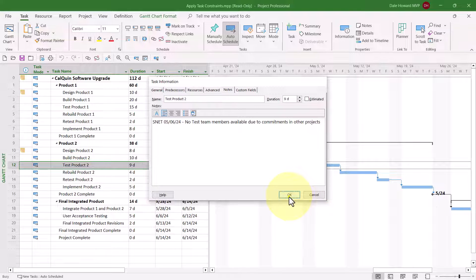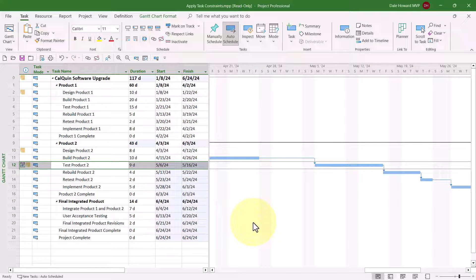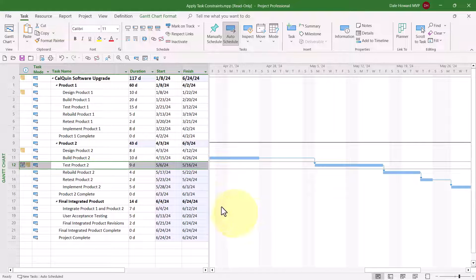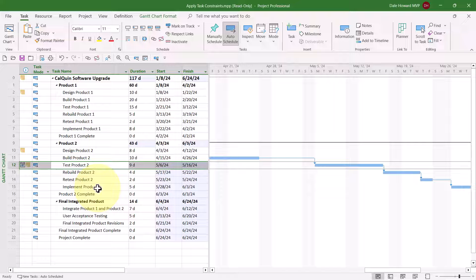When I click the OK button, notice that the Gantt bar moves one week to the right, and then notice all of the light blue cell background formatting for all these tasks. This indicates that by setting the constraint, the schedule of these tasks has been moved.